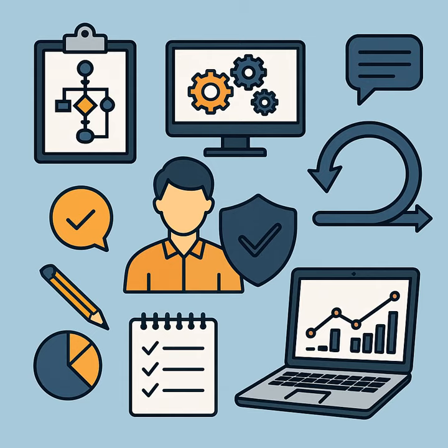All right, I'm following. So for our kitchen renovation, must have items are the absolute essentials. Like what? A working stove, a sink with running water, and enough lighting. Okay, those make sense. You can't really have a kitchen without those. Right. Then there are the should have items. They're important and they add a lot of value, but they're not absolutely critical for a basic kitchen. So like what? A built-in dishwasher, for example. Okay, that's a good one.